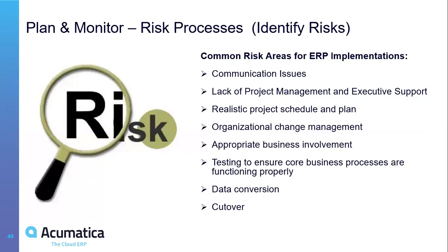My personal recommendation is always cut over, no parallel run. I made too much bad experience with parallel runs because the users still like their old system, right? And that's why they do everything correct in it, and in the last 1 hour of the day, they just hack everything into the new solution, into Acumatica, and this is then the quality of data that you get there. So I don't like it personally.